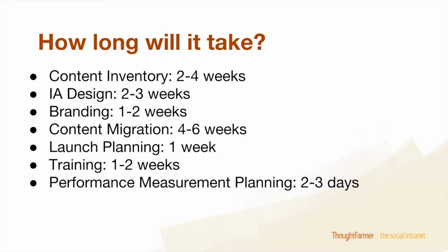On the flip side, though, if you take a phased launch approach, that can also set you up for success. Like I said, if you have more time to do it that way, you can make sure that a core team of perhaps one champion user per department, or one specific location of the office, starts out with the intranet, populates the content, and learns how to use it.